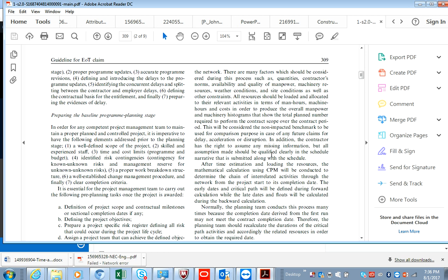representatives, i.e. the architects or the design team, etc., depending on whether or not they novate it over to you. So it could be in terms of approval gateways, in terms of your GA drawings, your drawing schedules, door schedules, windows, foundation works, enabling works, MEP works, mechanical, electrical, plumbing works. All of those packages will require drawings, even down to the last bolt or the pins or the bracings, the stud work, the cranes. They all will require design drawings, which will go for approval.